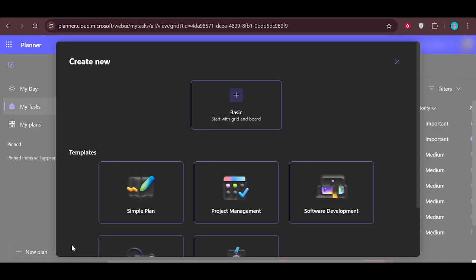Now, here's an important detail. This import feature is primarily designed to look for traditional Microsoft Project desktop files, typically with the .mpp file extension. In most standard setups, when you choose Import from Project Desktop, you'll be prompted to upload one of those .mpp files from your computer or from your organization's storage locations. If all you're working with is a regular project file, you can simply select it, upload it, and let the system create a new online project based on that imported schedule.